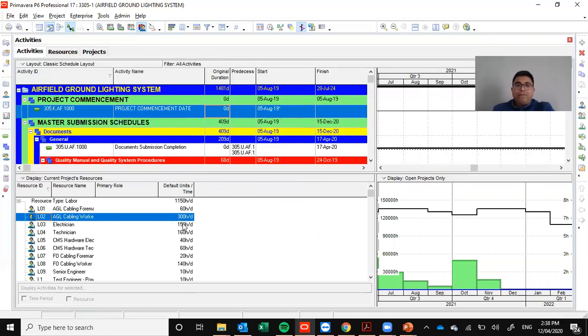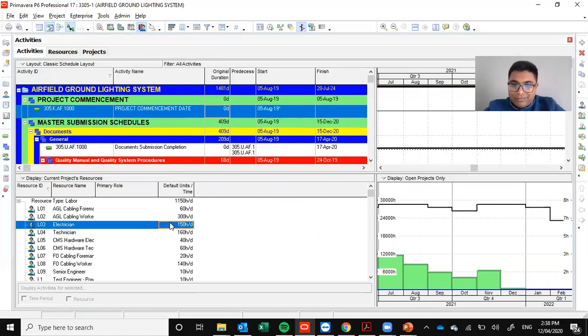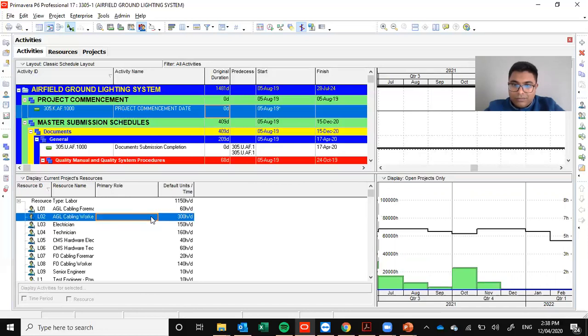And again, we have managed the duration. Actually, this project is already resource leveled. That's why we are not getting any overallocation, because we have spent almost 2 months to level these entire resources. And then we get a final plan: how many days it will take, exactly how many labors we have to pick up, or how much availability of resources we have to demand. Because we have to consider the duration factor, and parallelly the resource availability factor of the contractor also.